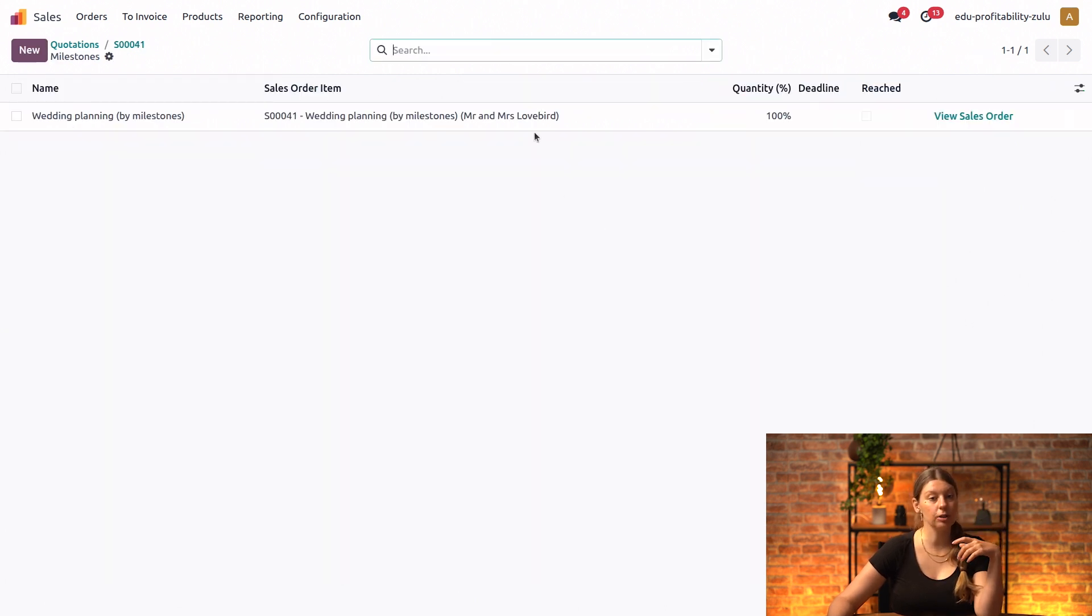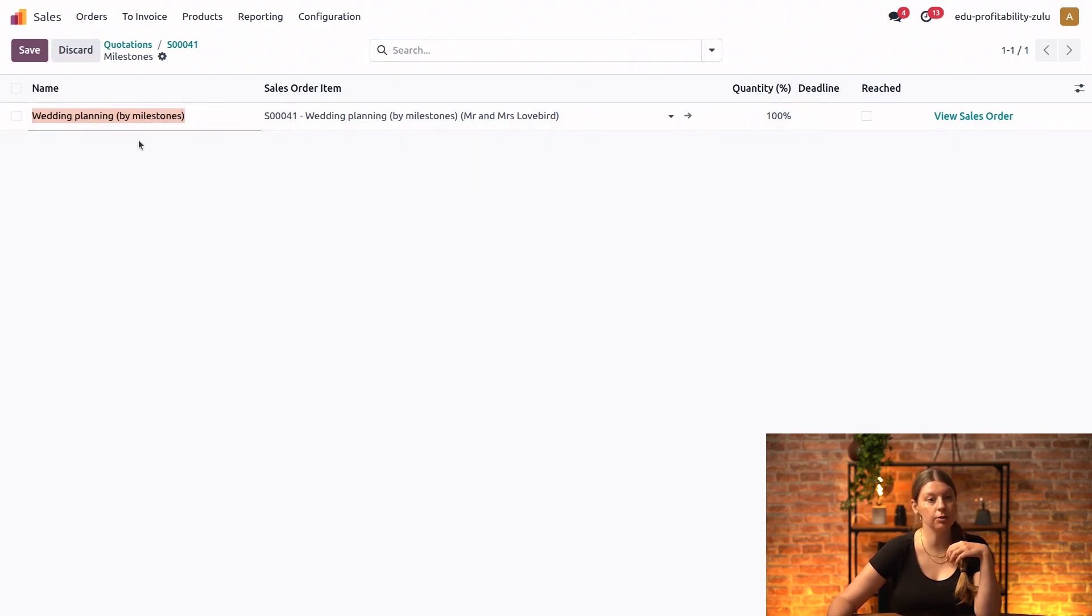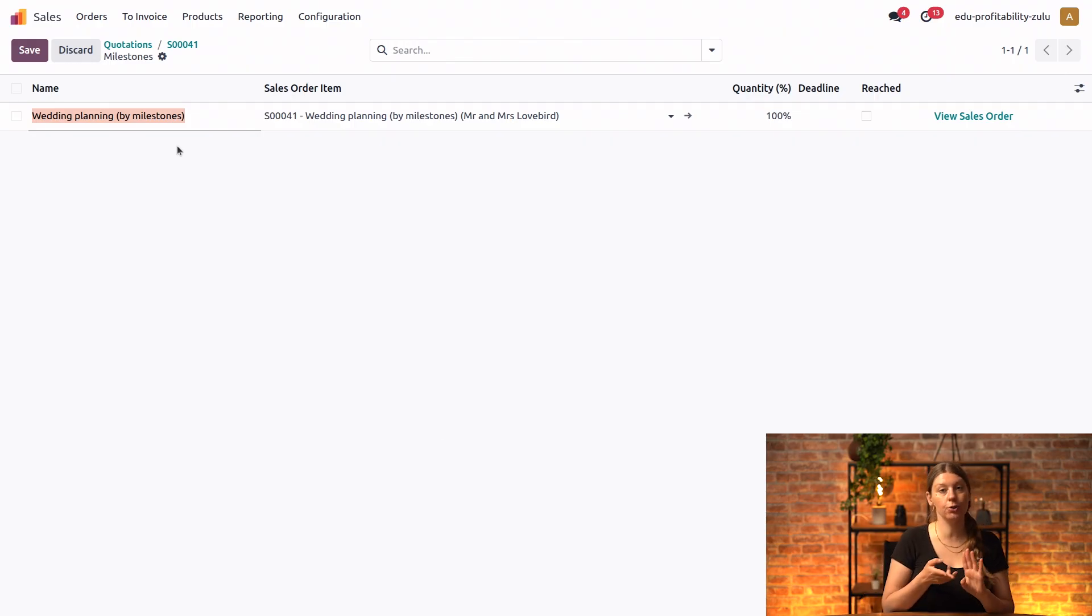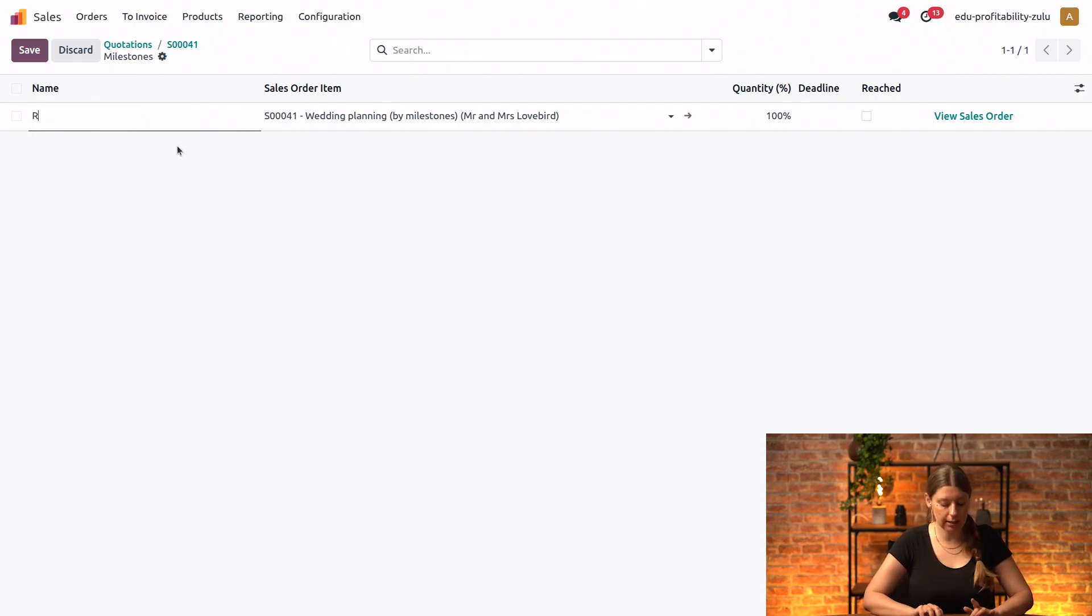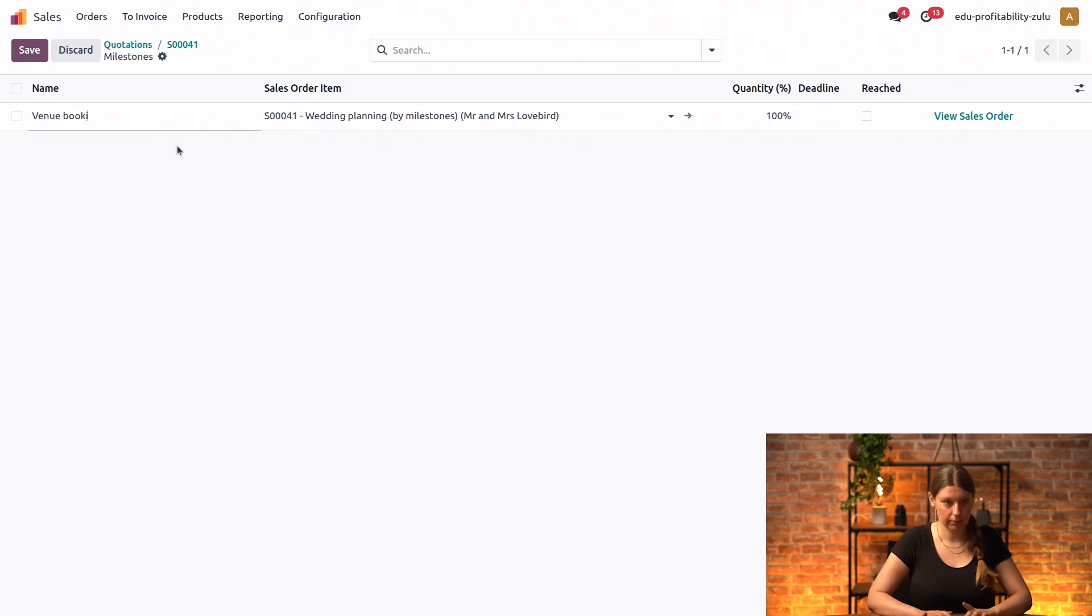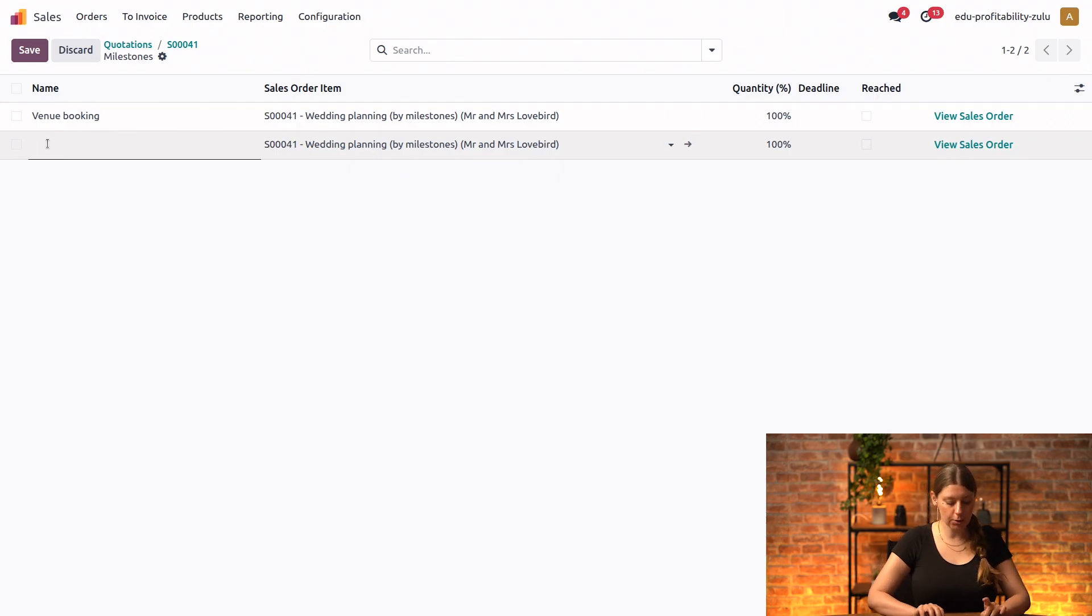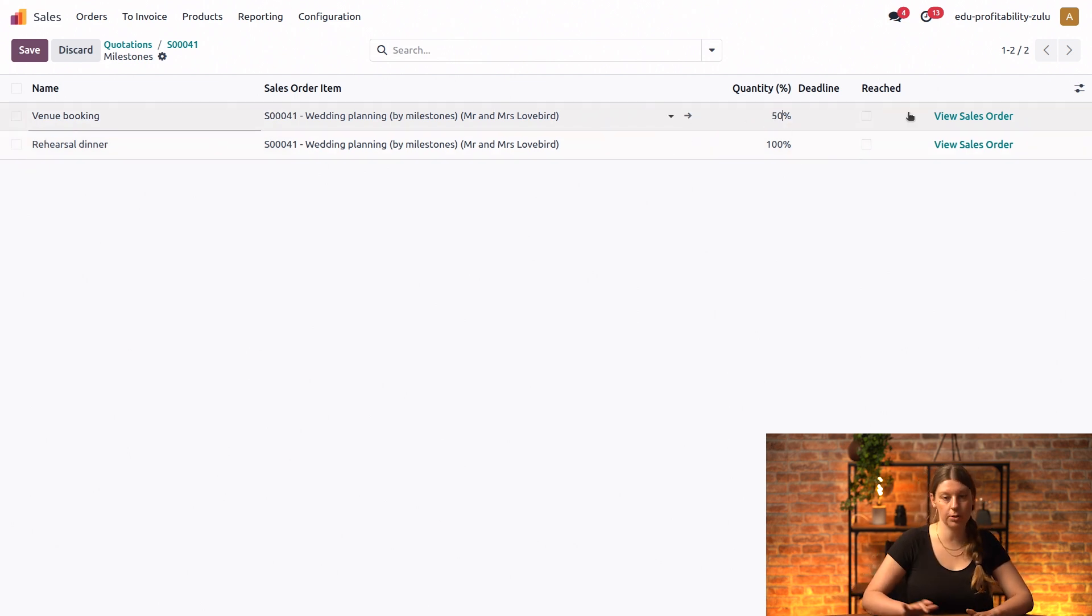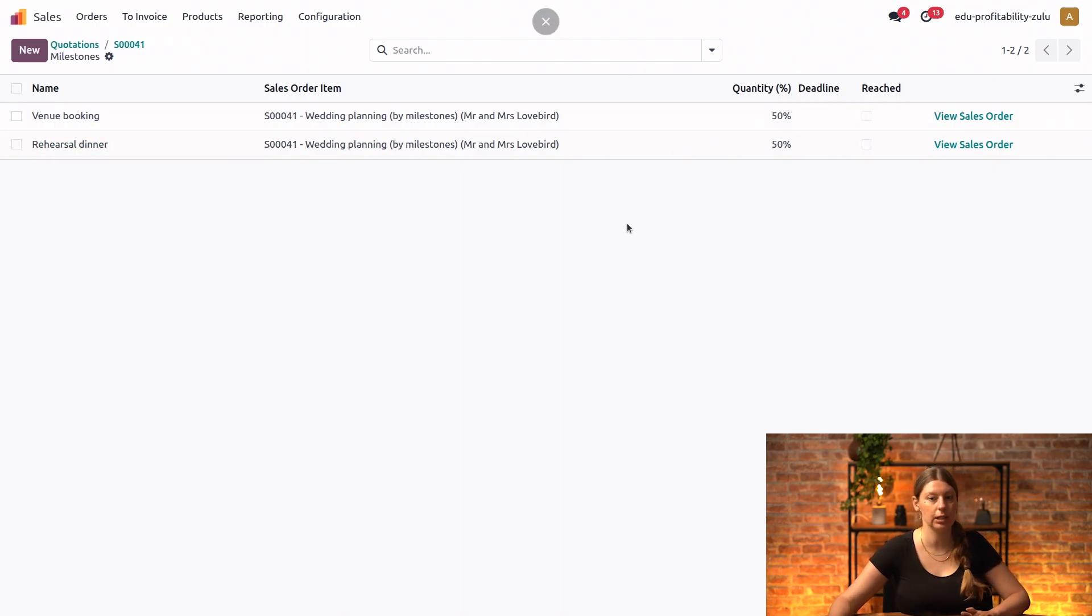So by default, we have one milestone always created. But what I can do is I can rename it. So I could say that for this project, just as with the previous one, I will actually want to have two milestones. I want to split my work into two milestones. And I will want to say that we have the wedding, the venue booking, just same as in our previous case, when we were not invoicing the client by milestone. And then we also have the rehearsal dinner. And I can say that each of those milestones composes 50% of what I have agreed with the customers, the price of my services.